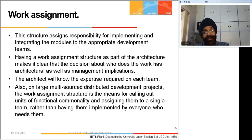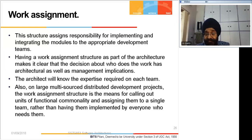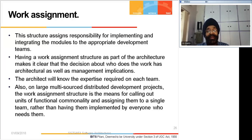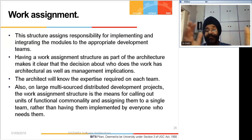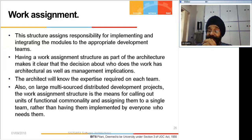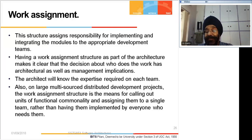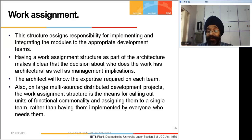Understanding of management process also becomes important for an architect. Work assignment is basically assigning work to various departments - outsourcing, multiple locations, multiple specializations, multiple teams. How the project can be suitably divided among various teams is taken into account. An architect cannot work in isolation from his environment; he has to understand the development organizations available to him. Work assignment is a PM's job, but the PM has to sit very closely with the architect to break up the job into teamable work.